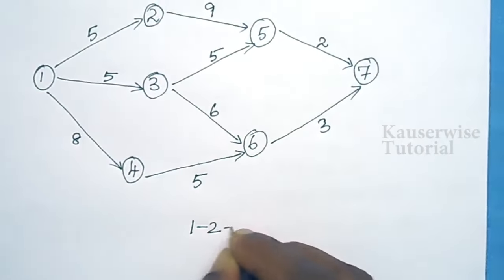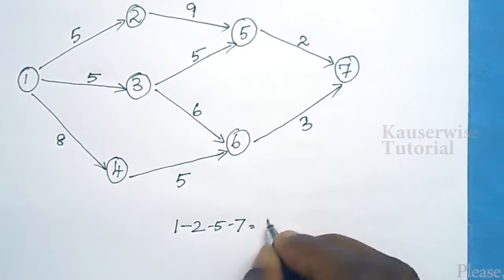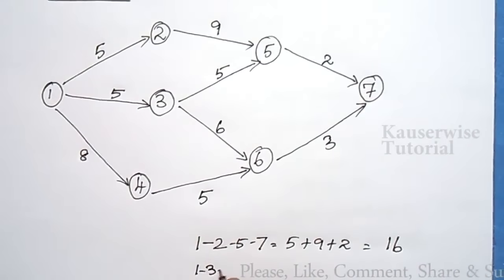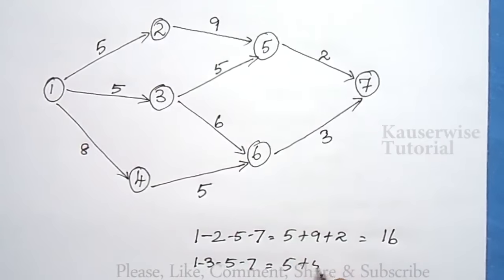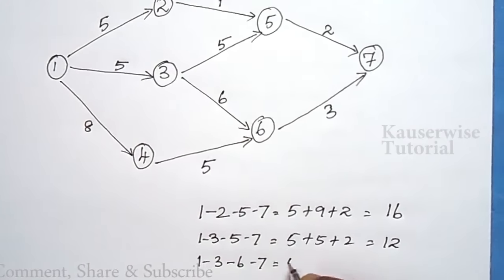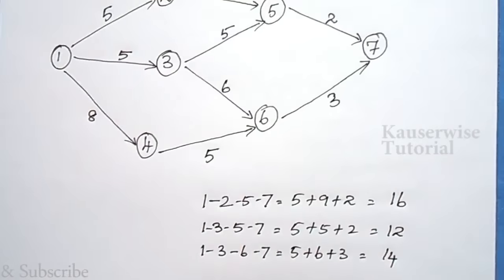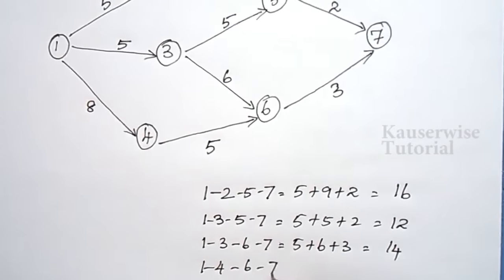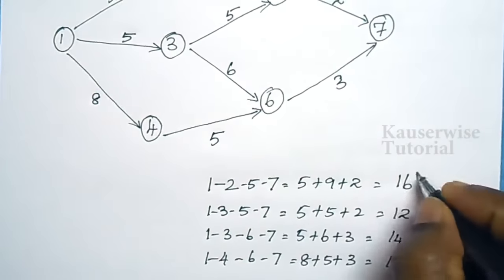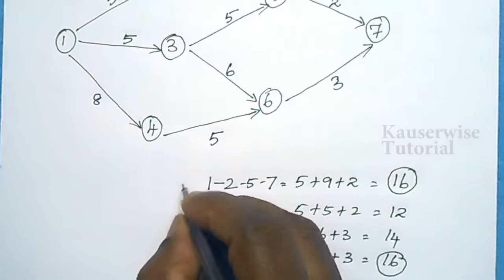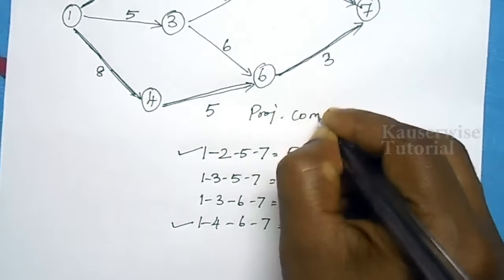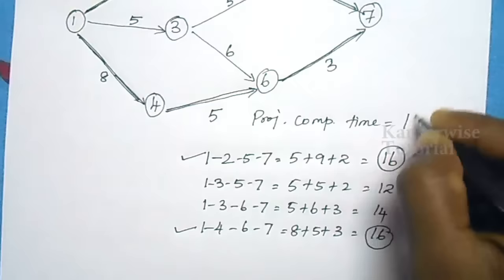Find the critical path again. The four possibilities are: 1→2→5→7: 5+9+2 = 16 weeks; 1→3→5→7: 5+5+2 = 12 weeks; 1→3→6→7: 5+6+3 = 14 weeks; 1→4→6→7: 8+5+3 = 16 weeks. Again we have two critical paths with 16 weeks each. The total project completion time is 16 weeks.